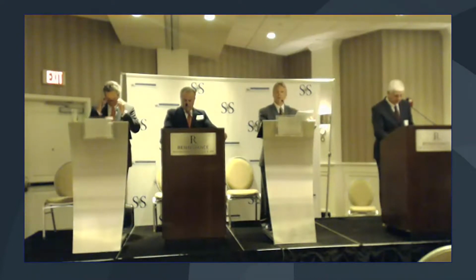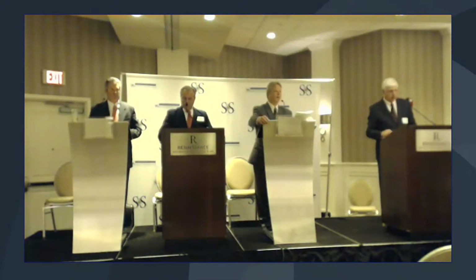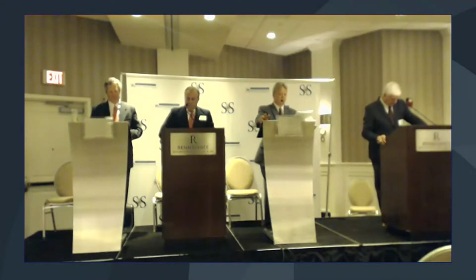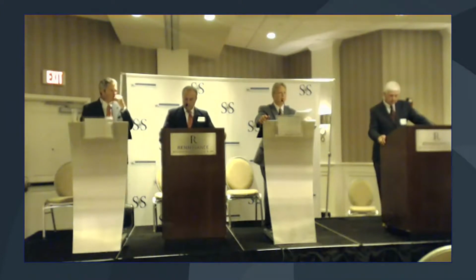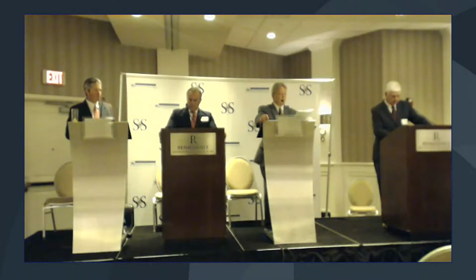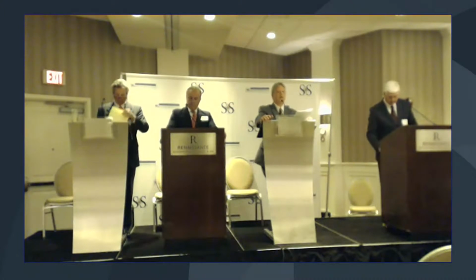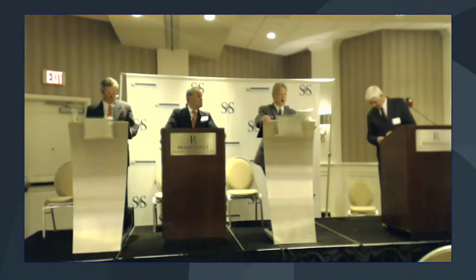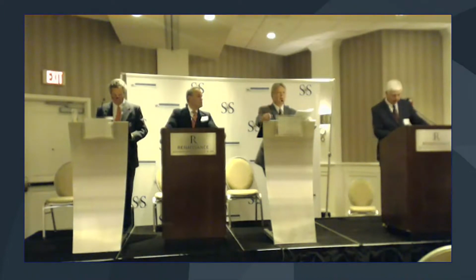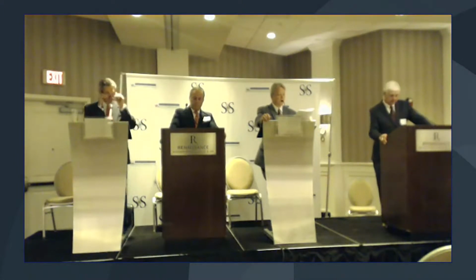It's insurance for the default of a subcontractor or a contractor. We'll give you a few of the basics. It's usually procured by the general contractor, not the owner, although sometimes it is by the owner, but not normally. It's mostly used by sophisticated general contractors, mostly by construction managers at risk. The underwriting focuses on the general contractor, not on the subs, because the insurance company looks to the general contractor to manage the risk and will really only issue these policies if it has a good relationship with the general contractor. Zurich is the major underwriter of Subguard. There are some others, but Zurich is the one that most of us run across most frequently.